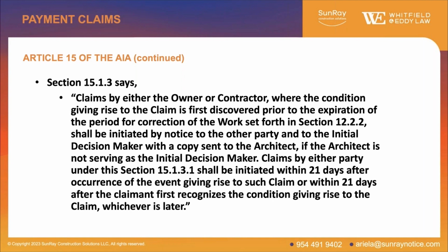So keep that in mind, because if you miss that deadline, that can potentially result in a claim being denied. Now, the other point of this is the claim has to go to the initial decision maker, which typically is the architect, with a copy to the owner. So you don't want to send it just to the owner if you're the contractor. You want to send it to both the owner and the architect. And owner, if you're making a claim, you want to send it to the architect and the contractor.